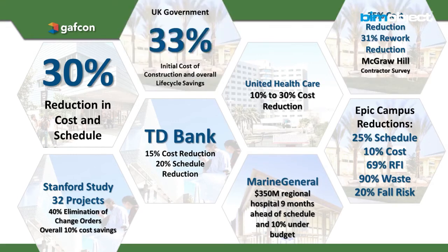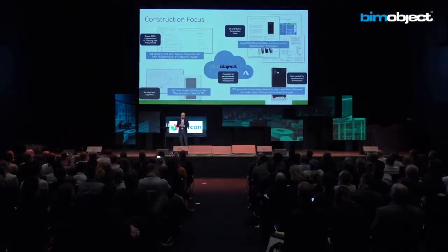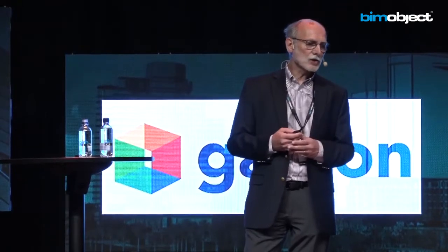Within the construction process, our focus is on the data. We have to approve the specification of every piece of equipment, and we also have to produce something called a submittal, which is all the associated documentation. Normally this is a very manual process, and we believe that the use of bimobject will completely eliminate all the manual elements of this process.